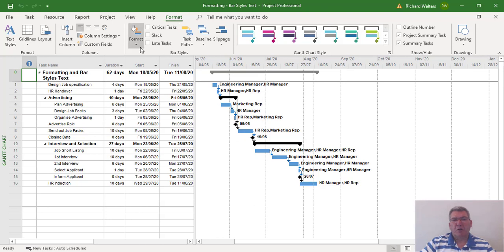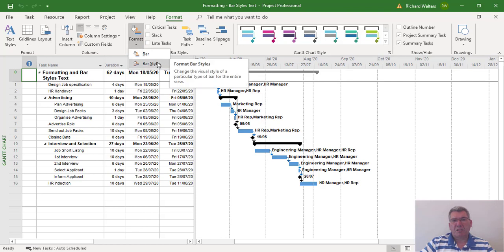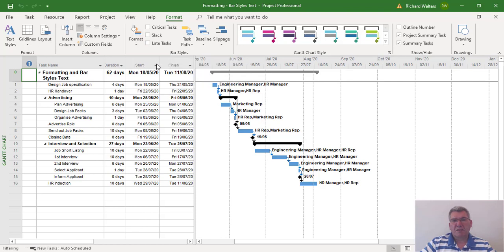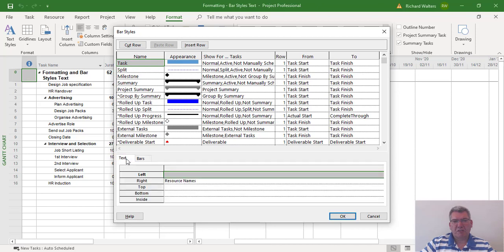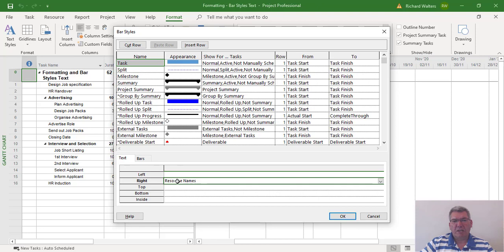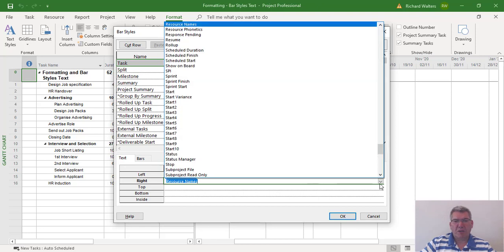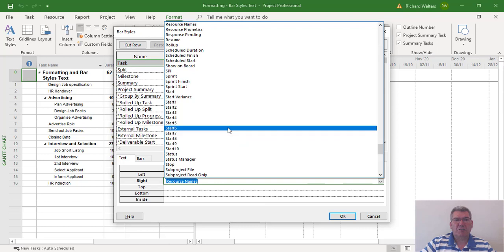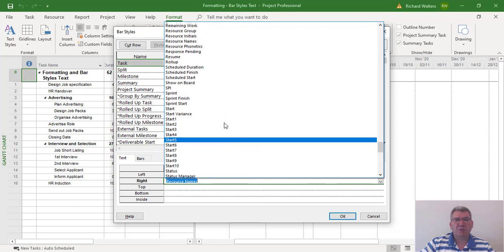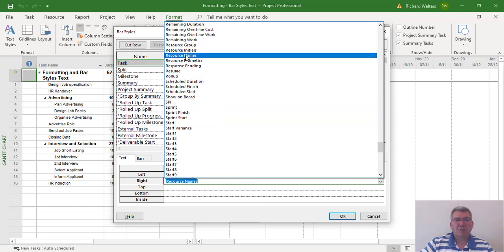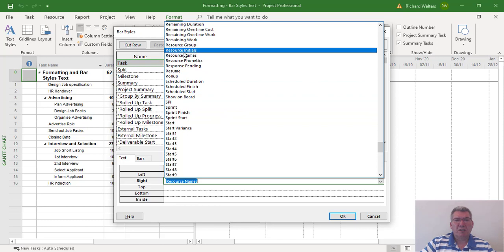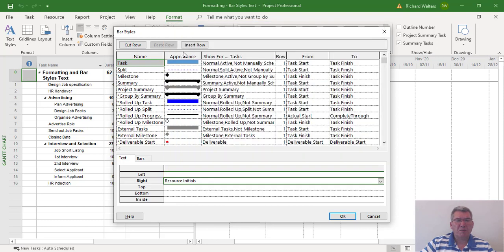So we're going to go to Format Bar Styles. Now at the bottom, we've got the text and bars options. We're going to use text, and we've got resource names, and we can change this to resource initials. There's a drop-down arrow with plenty of options to choose. So we're going to use resource initials in this example.